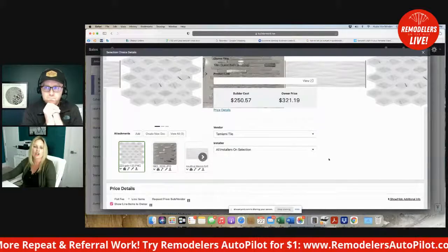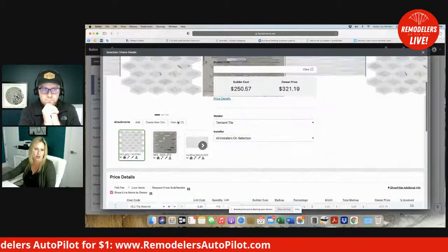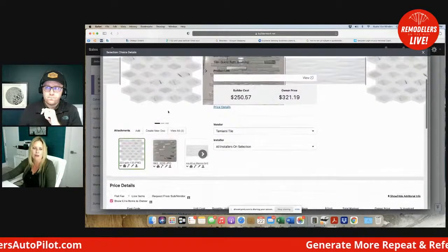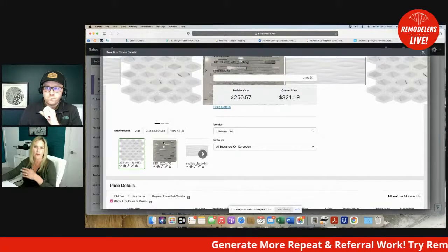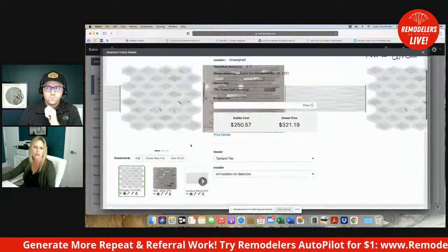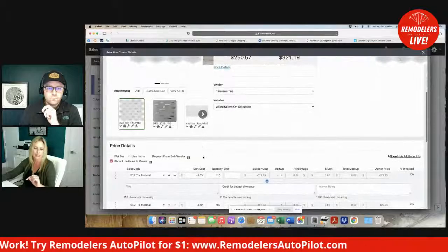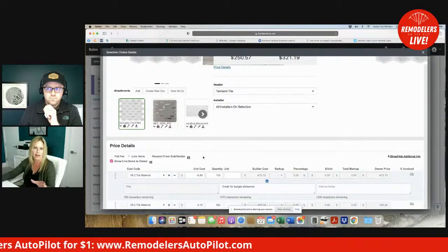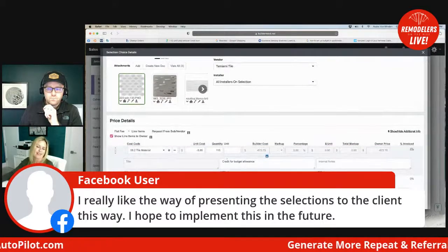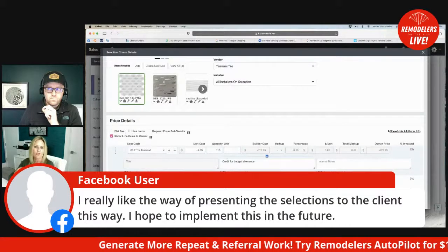Gotcha. Okay. So you can add your attachments here that will give you the photos of each material. I can't tell you how much confusion this prevents. When the guys go out there and there's 10 boxes of different tiles all over, they're calling me, and I'm trying to tell them over the phone what goes where. This really simplifies that, because my subs know that they can go into BuilderTrend and look at it. And usually all the answers are there. And every now and then the supplier sends the wrong stuff and they're like, this doesn't look like the one on your portal. What do you want me to do?